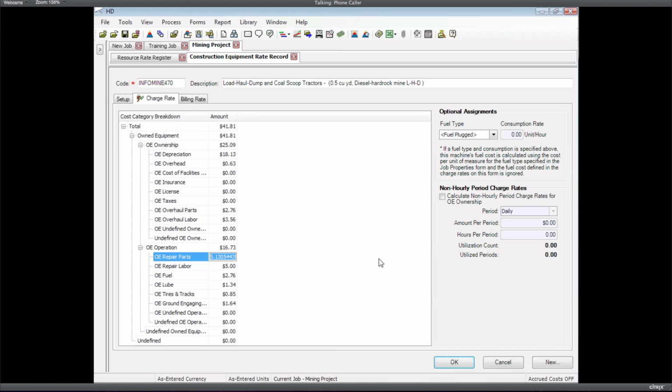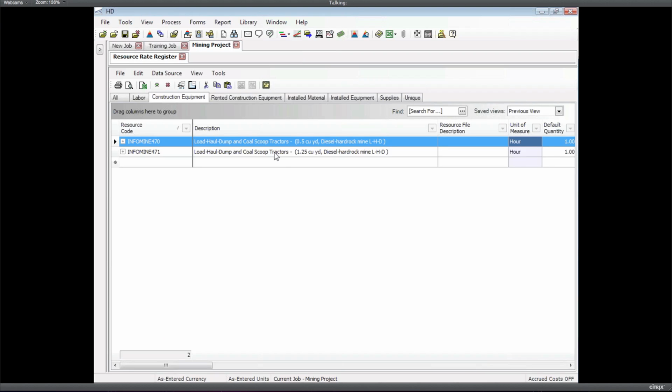Having used InfoMine in the past, and I'm not sure it's any different than any other industry, you really have to understand what they're presenting in their cost before you start just grabbing loader costs and the like, because there's capital recovery and mechanics costs. It's very prone to double dipping. If they're adding a cost for maintenance or mechanics, and on top of everything you're adding a mechanics or maintenance line item in your estimate, be careful, know what you're getting into.